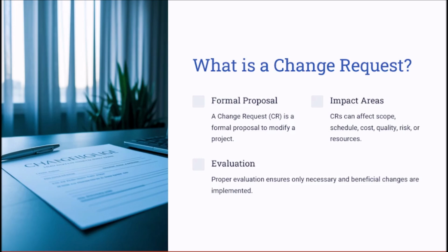For example, in a construction project, if a client wants to add extra floors to a building after construction has begun, this requires a formal scope change request. And without a proper process, changes like this could delay the project, creep the scope, increase the costs, or introduce risks.